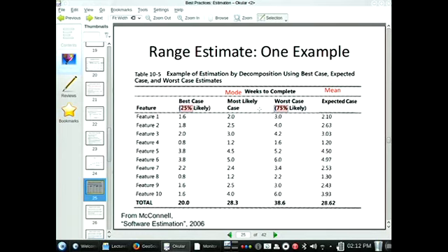Ponder that. So here we have tests and features of the system. I'd like to see you give a best case, a most likely case, and a worst case here. Sometimes people give an expected case as derived from this. Okay. The most likely case is the mode. It's sort of the peak. Sometimes people distinguish also a mean.